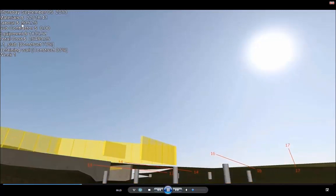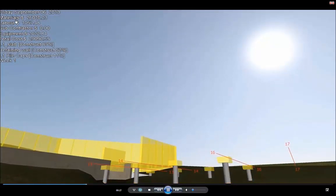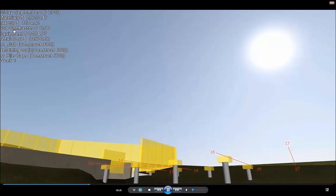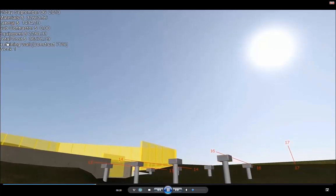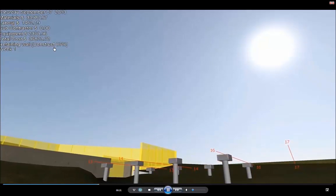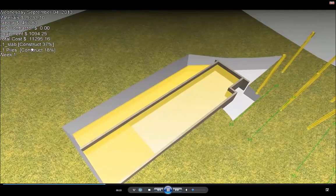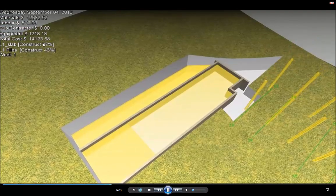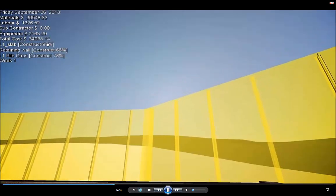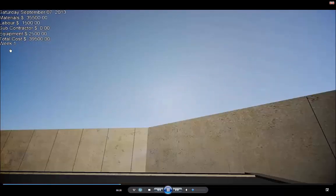What I have up here on the left hand side is the date and time stamp. I've also added materials and labor costs, equipment and total costs and you can see as certain components are being installed, it's highlighting the percentage of how far you are with that construction program.